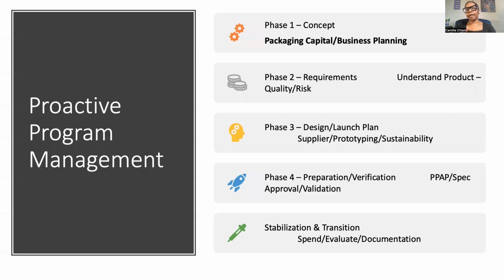Again, back to making sure you have standards, because if you have formal written standards for what your packaging is going to be for your company, when the quality team does their approval process of the PPAP, they're basically just checking off that yes, packaging has signed off on it and meets all of packaging requirements. And that will reduce delays, because sometimes this can delay a launch, and you don't want to delay a launch because the quality team is measuring the thickness of a corrugated box with the caliper and saying that they don't know what it's supposed to be.